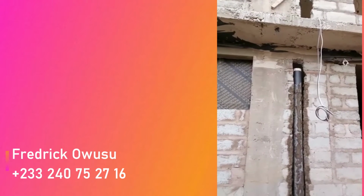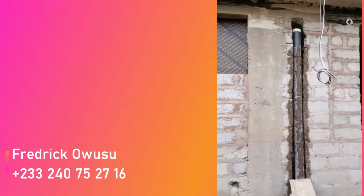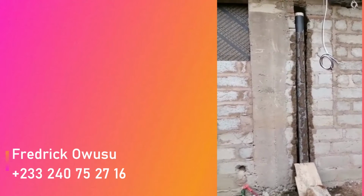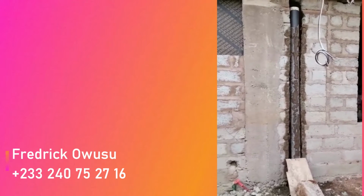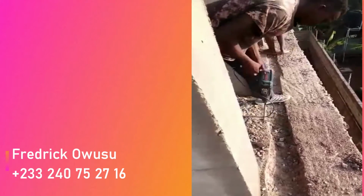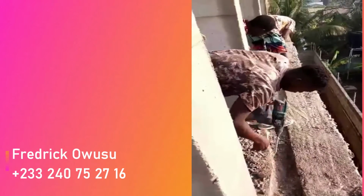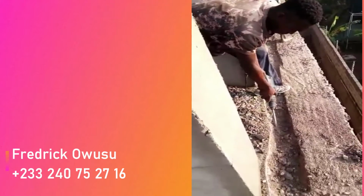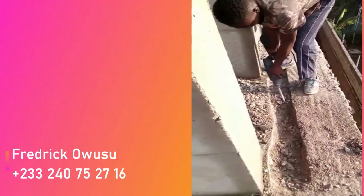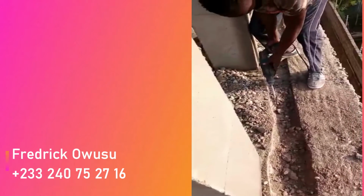Here he has to improvise because Mr. King David is requesting a WC at the upper floor where he wants to have his pergola or just a party area. The intention was not to have a WC there, but later he decided to do that. So Fredrick Owusu had to improvise from the ground floor all the way to the top, and that is why you have this pipe. And then this drilling, as you're seeing, we have to drill the whole floor. They use a machine, not a chisel. They use a machine for all the drilling. So even though your floor might be casted, they can still do drilling and then fix all the piping work. Should you perhaps not have known and then the floor was casted, they can still do the piping work for you. So Mr. Fredrick Owusu will be there to assist you.